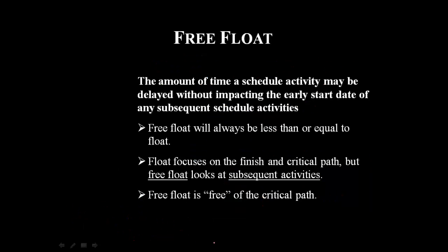The next concept is free float. Free float is the amount of time a scheduling activity may be delayed without impacting the early start date of any subsequent scheduling activity.